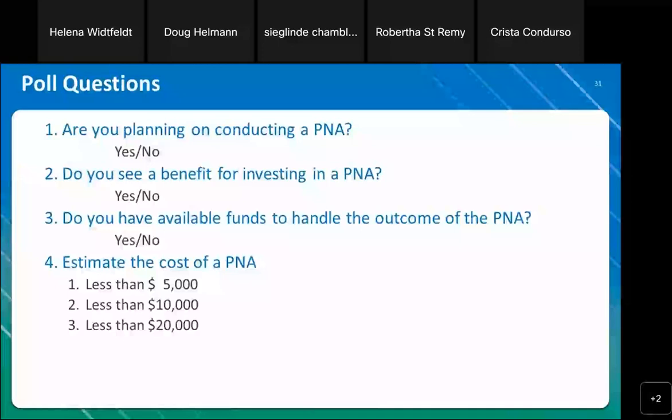So don't let those physical needs assessments expire if you can help it, because updates can be just as costly as actually doing a physical needs assessment. But 120 units, the update was 5,000. So the new one up to about probably 10,000. Doug may have other additional insight.